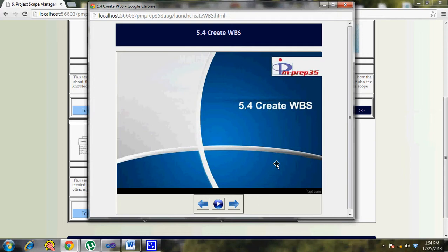It tells what are the project deliverables, what are the acceptance criteria, what are the project boundaries. The WBS is a hierarchical representation which you normally build sitting with your team. You break down your scope into manageable parts with the help of your team and different stakeholders, so that they are comfortable, or the customer is really comfortable looking at it, knowing that all the scope of the project is covered.